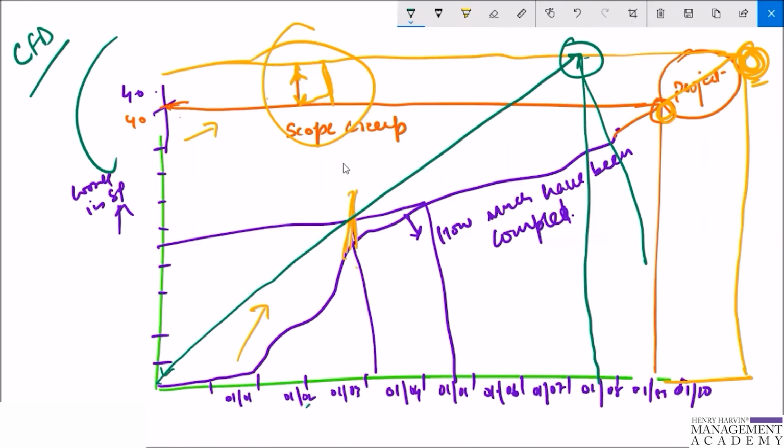So in a project where clients are adding a lot of work mid-project, a burn down chart will not be able to give an accurate reflection of the project team's output and could lead to performance questions from the client. But the burn up chart can quickly make the client reevaluate whether they really need that extra bell or whistle. Unfortunately, burn up charts are slightly more complex to interpret than the burn down chart, and so will often require some sort of explanation to the people who are not familiar with them.